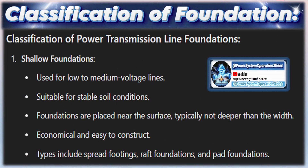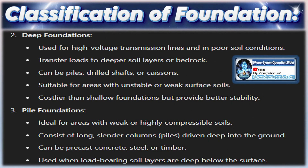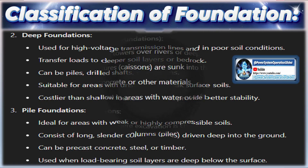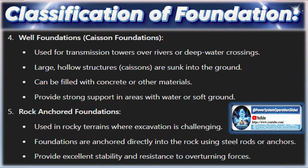During this phase, advanced surveying technologies are often employed to collect the necessary data. These include LiDAR (light detection and ranging), GPS-based mapping systems, and aerial surveys using drones or aircraft. These tools allow for highly accurate measurements of the terrain, including elevations, slopes, and obstacles such as rivers, forests, roads, and buildings. The survey also identifies any potential construction challenges, such as steep inclines, rocky terrain, or soft soil areas that may require specialized construction techniques or design modifications.